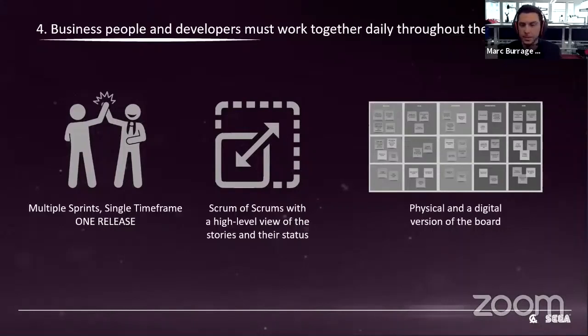for their daily scrums. So we'd pull that board up and they would update their tasks, update the time remaining, things like that. But we still kept a physical version, which we would use for the scrums. So it was a much higher level rather than at the individual tasks handed out to people. We had what we call stories, which were the collections of things, and we would move those physically across the